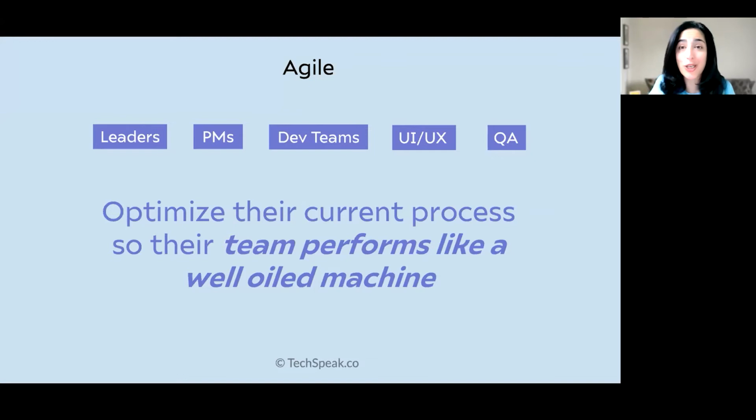Remember in the beginning, I shared the hypothesis, test, learn, revise cycles that we're doing? By getting your team to execute really, really well and shortening your sprints, going from 2-week sprints to weekly sprints to daily sprints, even multiple times a day sprint deployments, that shortens your learning time. It gives you a lot more data points to make better decisions with what to do next, right? What steps to take next, which of course helps you refine and iterate faster and more efficiently.